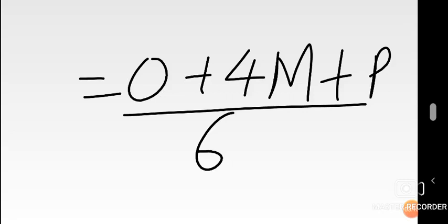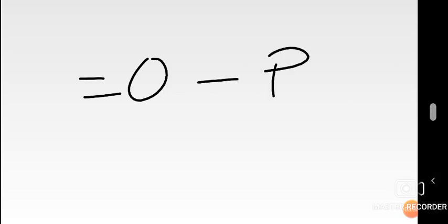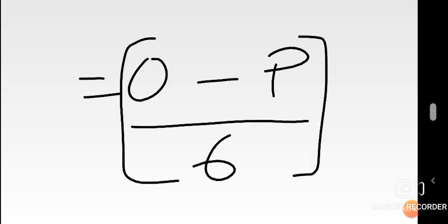Then under this same PERT, the project evaluation method, you also at some point need to calculate the variance. The variance has a formula as follows. If you're asked to calculate it in a question, it's O minus P, divide this by 6, then square.